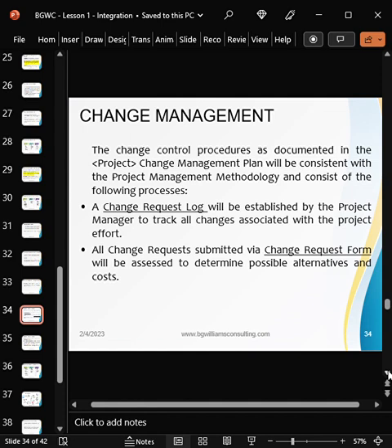So which one will he have to honor? He will definitely honor the change requests that align with the business case or the project objectives. So if I send a change request to a project manager and it doesn't align with the business case, maybe because of my selfish interest, or maybe because it's not benefiting me, as a project manager, I don't need to honor such. Is that clear now?